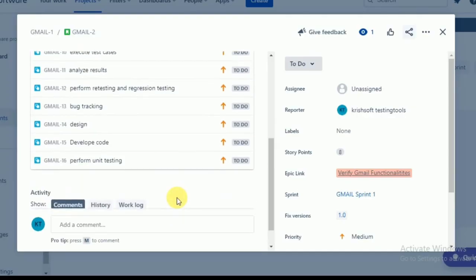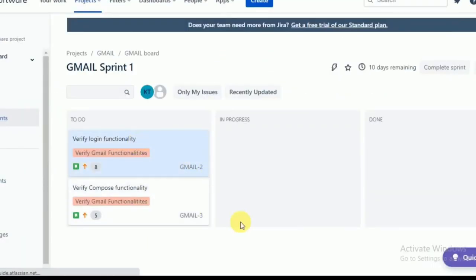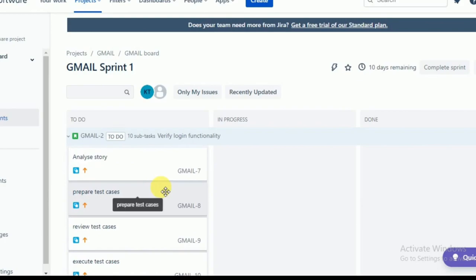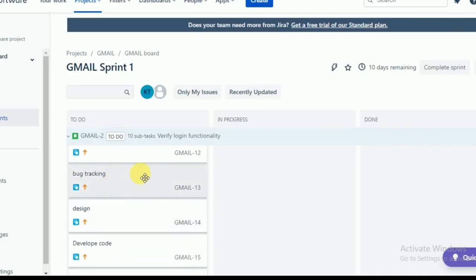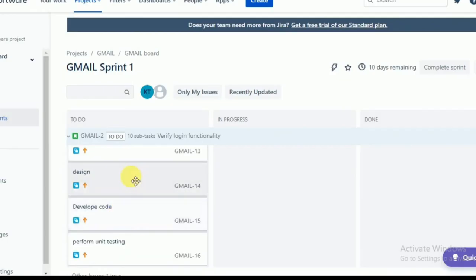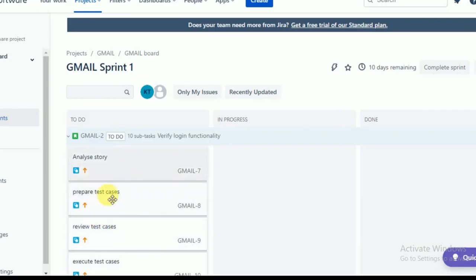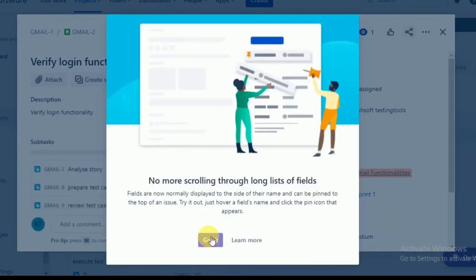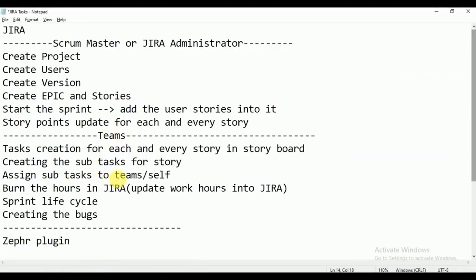For the development side, add: 'Design' as one subtask, 'Develop the code,' and 'Perform unit testing.' Once you go to the storyboard, you can see all the subtasks created for this story — 'Verify Login Functionality.' Refresh the page and you can see all tasks: analyze story, prepare test cases, review test cases, execute test cases, analyze results, perform retesting and regression testing, bug tracking, design, develop code, and perform unit testing — total 10 subtasks.